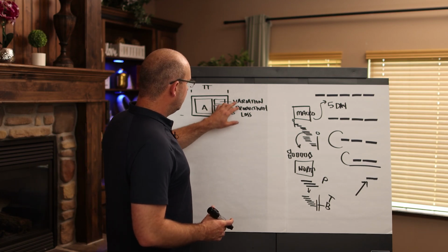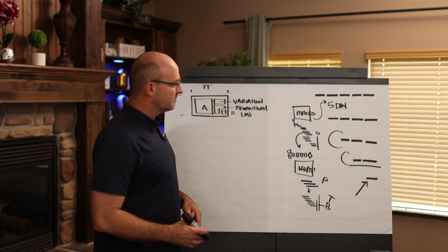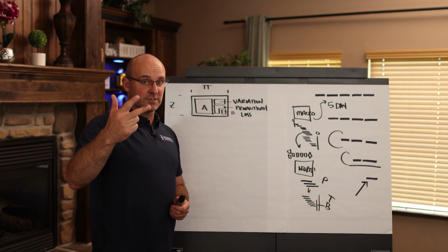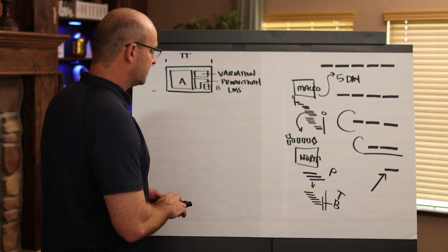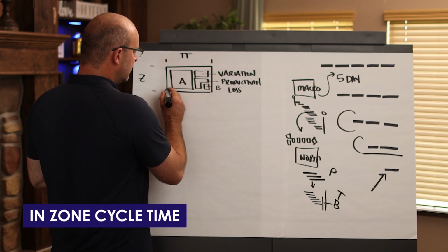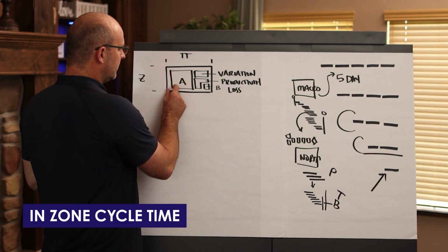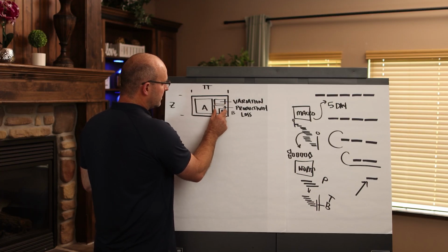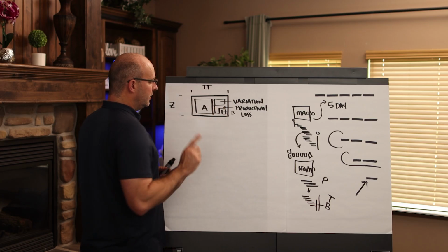So anything, variation can cause productivity loss, but there are other things. Too many people, too many materials, too much rushing, pushing, and panicking, too much whip, too much distraction. The activity time isn't the overall time that it takes. The in-zone cycle time is not only how long it takes to prepare, do it, but also to absorb variation and any productivity loss plus your buffer.